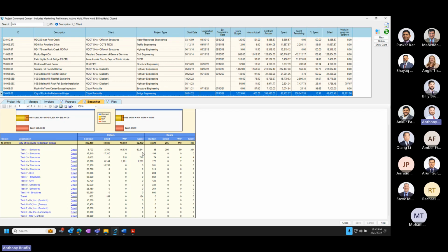So a very simple fix is looking at the monthly billing reports, recognizing that this one phase is significantly over budget, and making the necessary corrections to move those charges to the correct area, which makes the whole project track better.